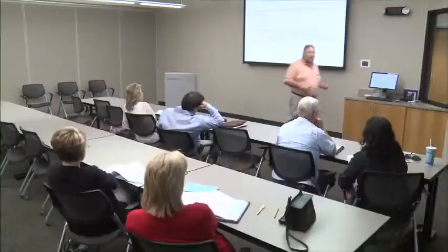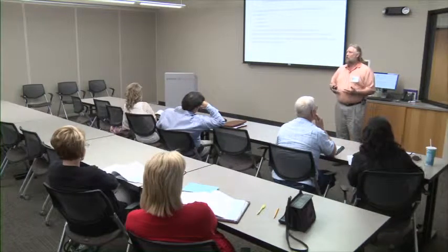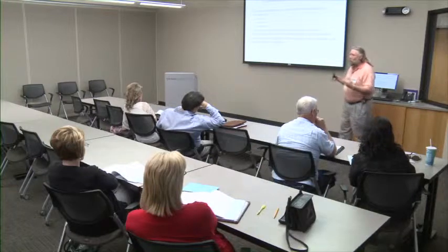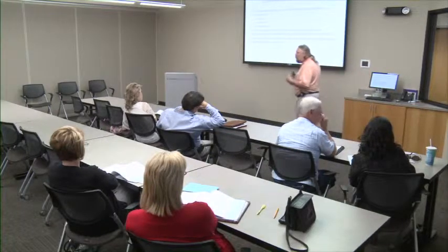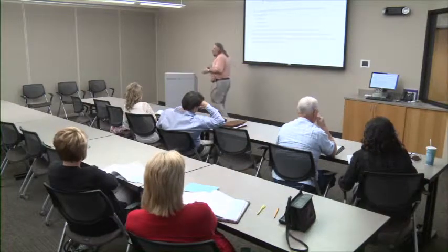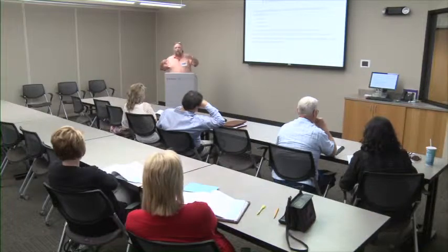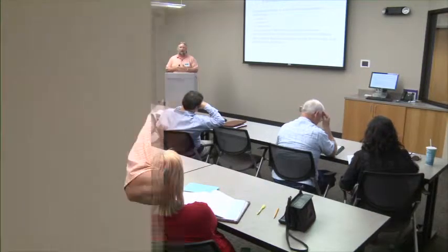Now, initially when you do planning and scheduling, you automatically assume that you have unlimited resources. Okay? That whatever you want to do, you're going to have. But in the real world, that doesn't happen. When you start trying to put together plans and scheduling, you start by assuming everything's going to happen at the same time, and then, once your plan's together, you can look at what really is not going to happen at the same time.